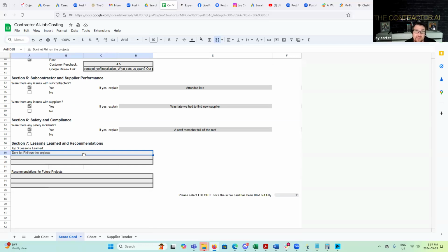Same with you. If you can't take accountability, or if you can't get to the end of this process and say, hey, you know what? I underpriced the material on this job. I'm not going to do that again. Why did that happen? Because I didn't check with the supplier what the material was supposed to be. I just went ahead and bought it and didn't get a price. All these things will start to be very obvious to you. The lessons that you've learned.